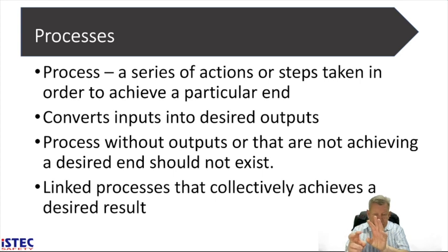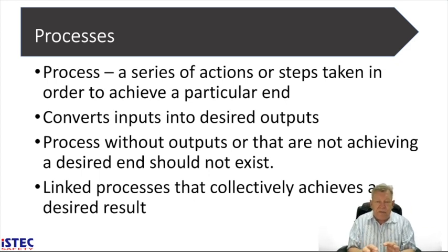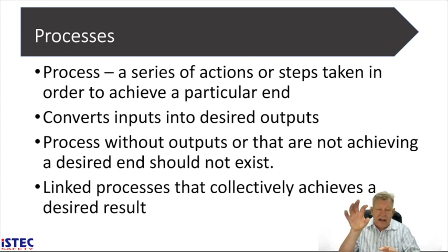I then take that output of high risks and I focus the small amount of resources that I have, and I only manage those things until they are as low as reasonably practicable. Then I go back to the process of the risk profile and I select the next level of risks, and I manage them down to as low as reasonably possible by the risk controls.